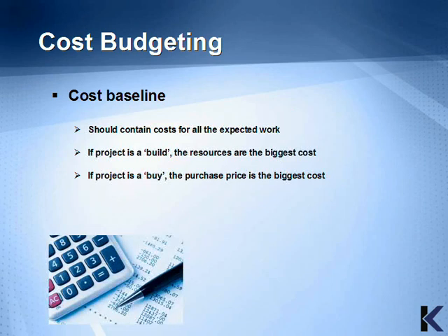The cost baseline should contain costs for all the expected work. If the project is a build, the resources are the biggest cost. If a project is a buy, the purchase price is the biggest cost.